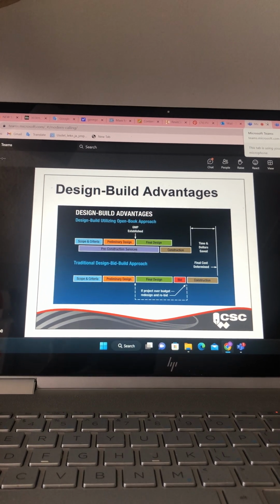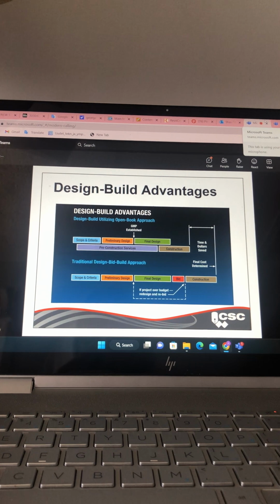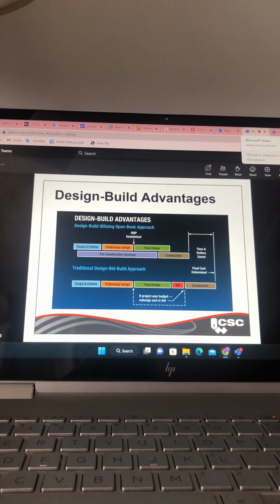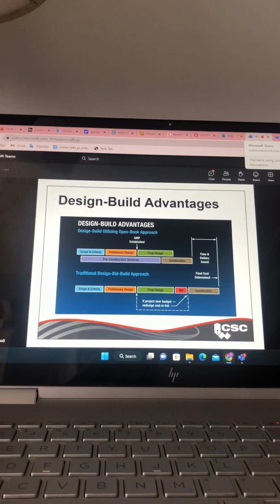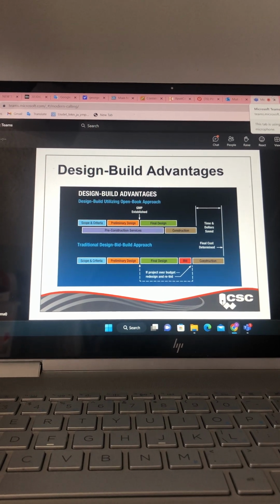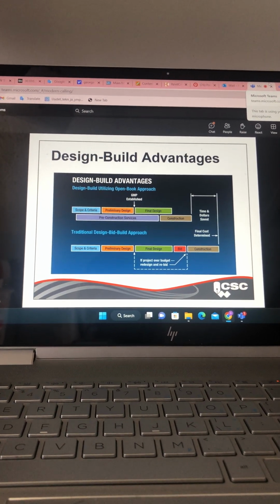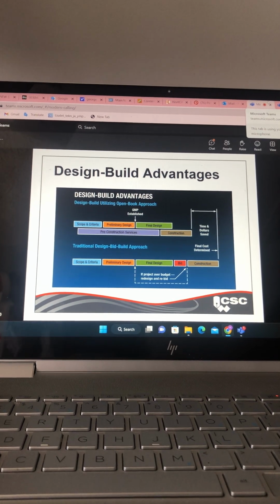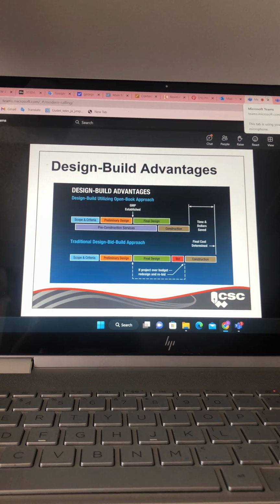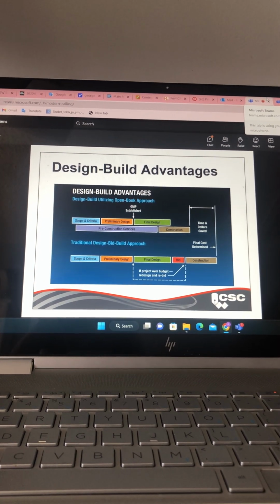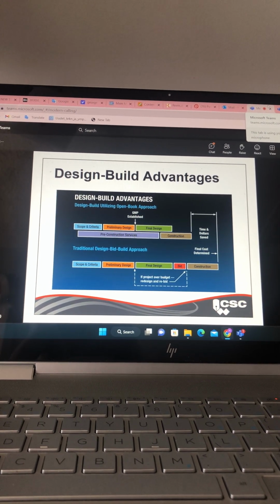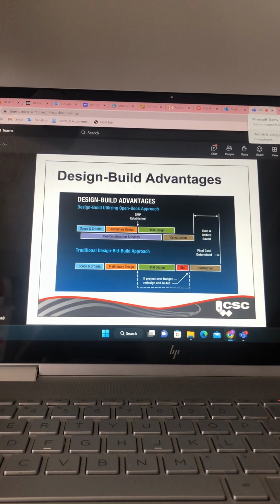Okay? To Nicholas's question, what would happen if there'd be a $4 million additional cost? Would the work need to stop until funds are secured? Absolutely not. Under the design build approach with the GMP, should the building cost that extra $4 million, it's coming out of the contractor's pocket because they have guaranteed the owner a maximum price to build the building. Does that make sense? Perfect.